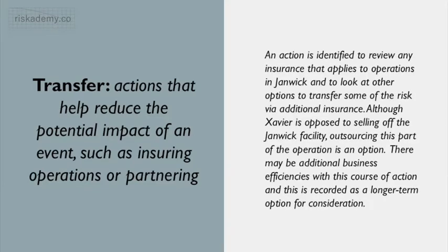Following the assessment, an action is identified to review any insurance that applies to operations in Jamwick and to look at other options to transfer some risk via additional insurance. Although the CEO is opposed to selling off the Jamwick facility, outsourcing this part of the operation is an option. There may be additional business efficiencies with this course of action, and this is recorded as a longer-term option for consideration.